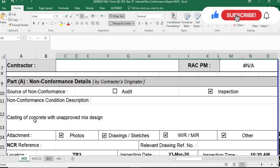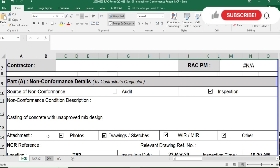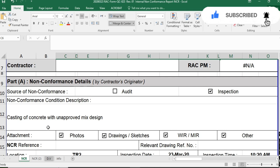Here you have to fill in the non-conformance condition description — for example, casting concrete with an unapproved mix design. This is a non-conformance violation of the project specification and quality plan. For supportive attachments or documents, if you find a non-conformance on site, you should take some photos and attach them, along with drawings.